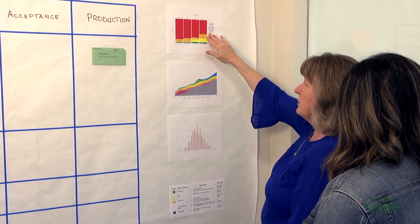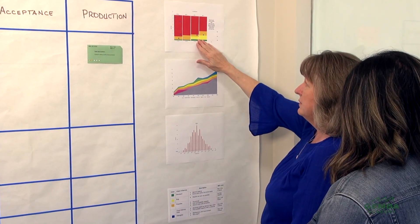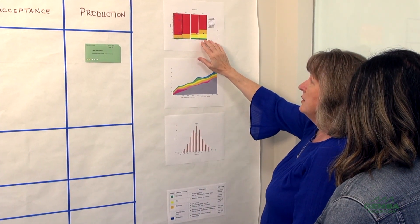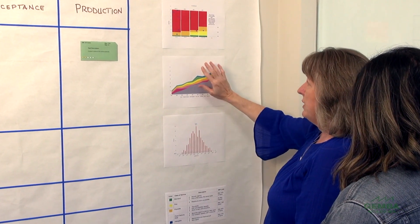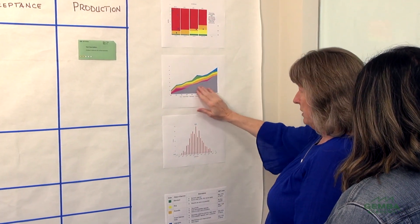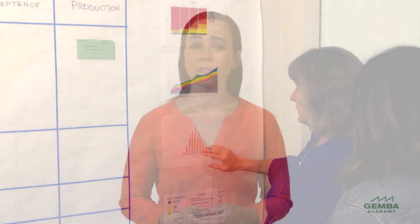Teams practicing Kanban collect data on their process, tracking metrics such as WIP, lead time, cycle time, and throughput. When workflow is relatively stable, teams can expect similar work items to take a similar amount of time.